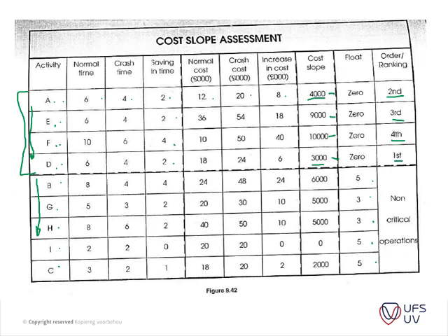Now you can establish what items I need to reduce this project by 5 weeks. So we can see immediately A, E, and F will apply, and we're saving 2 weeks, 2 weeks, and then we're saving 4, but we only need one of these to get to our required 5 weeks. So keep that in the back of your mind, and I think the next table actually explains it very well.